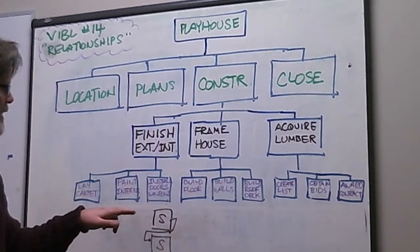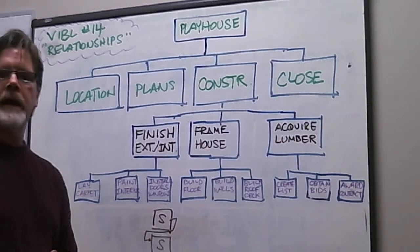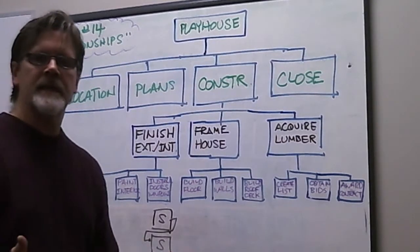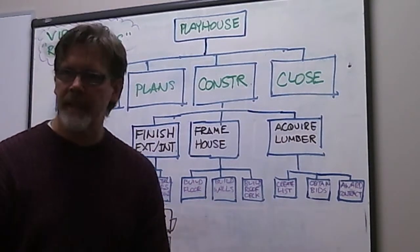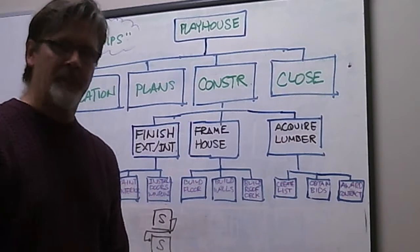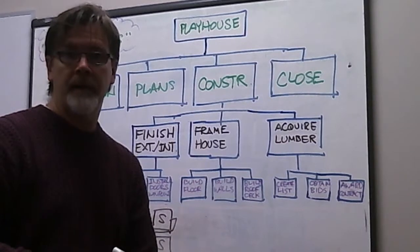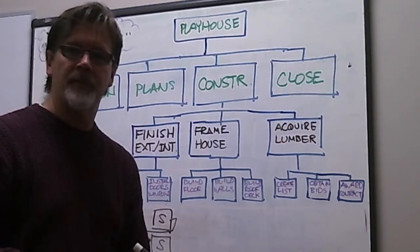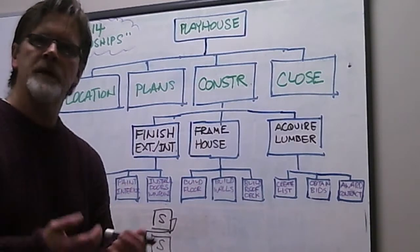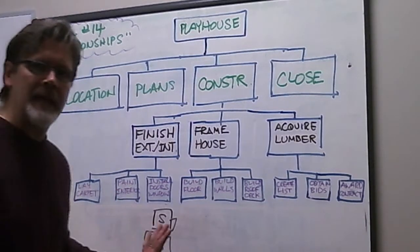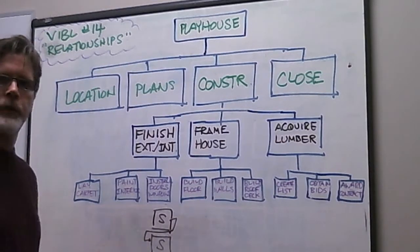We could conceivably start one and start the other to speed up the project. Instead of having hard logic between them, we could have them happening at the same time. As they happen simultaneously, the work is doubled up and we get things done in a faster time frame than if we used the hard logic of a finish-to-start relationship. We gain speed and can accelerate the project with a start-to-start relationship.